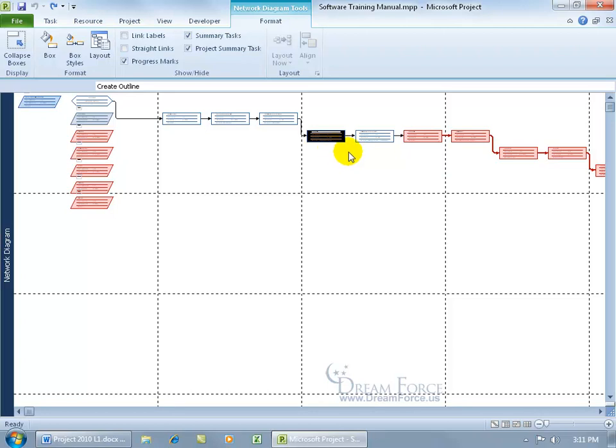How many days can I push these tasks out before they become critical? And it bumps those tasks that are critical, that bumps the next one, so it pushes out the project's finish date. Well, Project has what's called slack time. It's the amount of time a task can slip before affecting other tasks and/or the project's finish date.